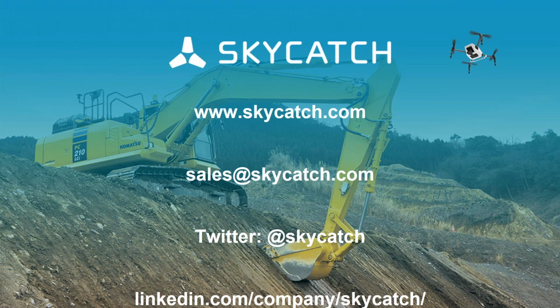Look, the beautiful thing about using the Edge 1 is that we fly active working areas, and on the larger sites, we do multiple collections. With the Edge, we can actually process and collect the positional information during the flight. For the residential areas, the active areas, we'll easily collect something like 600 by 600 meters, easily processed on the Edge. We move to the next flight area and fly again while it's still processing, and continue that process as we need to. But we're not flying the whole, say, 5K alignment at once. We only need to collect our as-built information from active working areas where materials are actually being moved. So we manage that quite easily.